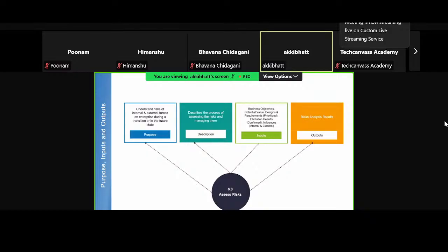if resistance to change is anticipated, right? Some people do not want to change. And I've seen that many times, especially working in the government. Mitigation could include stakeholder engagement, training programs, or change management initiatives. I've heard, "I don't want to change this system because I've used that for like 20 years. And if the new system comes in, I'm not that well prepared. I'm not trained enough. So I might get kicked out from my job and somebody will replace me because they know how to use it." Things like that. So understanding those risks, capturing those risks, and capturing the impact of those risks, learning and development might be required if you were to go with this particular solution.